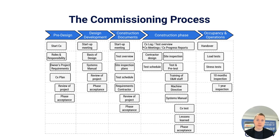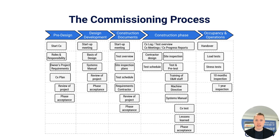Then we come to the construction phase. There's a long gray box at the top of the construction phase — that's the commissioning log, the test overview, commissioning meetings, and progress reports — activities happening continuously during the construction phase. Please note that at the end we have our commissioning test, the final test of the project, followed by lessons learned, phase acceptance, and then we move into the occupancy and operations phase. This is a slim view of the activities attached to the individual phases — some activities will expand across different phases, shorter or longer, depending on your specific project.